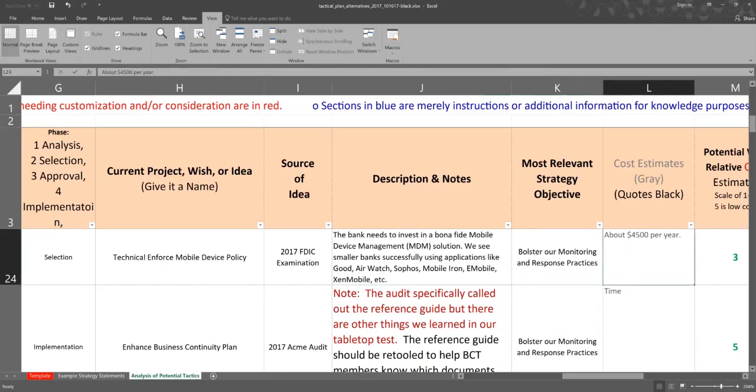And, I don't know if this estimate's any good or not, but what this column does, by the way, if it's a solid quote, we're going to use black. If it's an estimate, we're going to use gray. Just to make it easier for us to tell when we actually get the quotes. Again, it lays a nice paper trail as to how we're deploying new technologies, that sort of thing. I do have a client that has a column in here, risk assessment completed, because they wanted to demonstrate to their auditor, which was me, that they're doing a risk assessment when necessary. They've had a lot of NAs in there, and we talked about that, but you get the point.